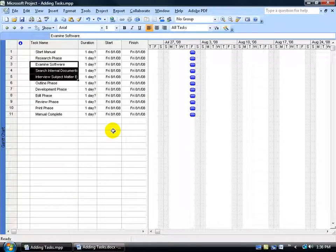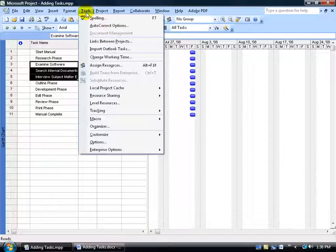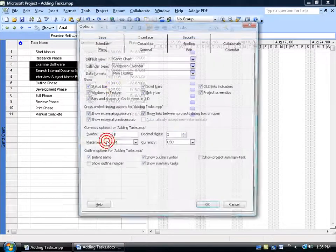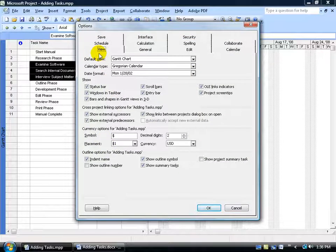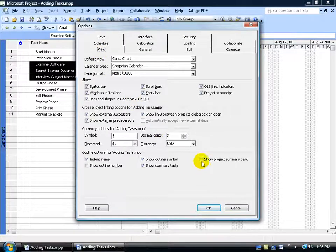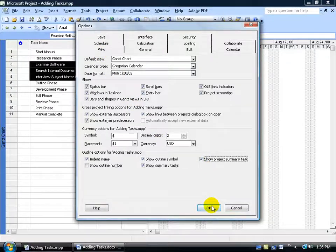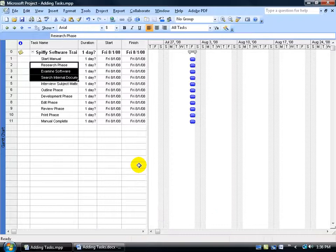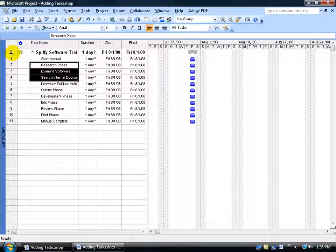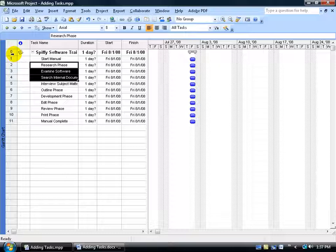The next thing is to pull in the project summary task. You can do that by coming up, clicking on the tools menu, going down to options, on the view tab in the lower right corner go ahead and check the box show project summary task. Click OK and a couple of things have happened. The least of which is it pulled in the summary task here and it gave it the task number of zero. Now that zero means that it's not really a task it's just a summary task at least for the project as a whole.